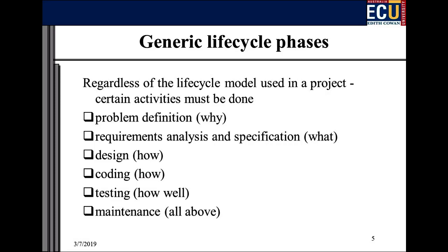We're going to get things wrong. So part of it's us that will misunderstand the requirements, and the client signs off on it anyway, and we start producing the wrong thing and it has to be changed. And part of it is that if you show someone something, suddenly they get these ideas of how it could be better. Right? So this requirements and analysis phase, as it's called, isn't really, in real life, a static phase that you get through and never revisit, right?